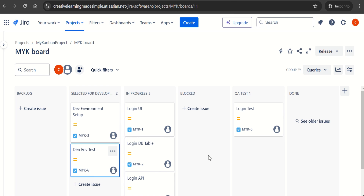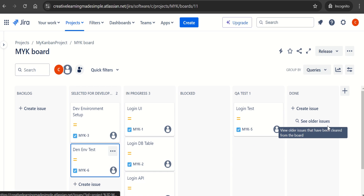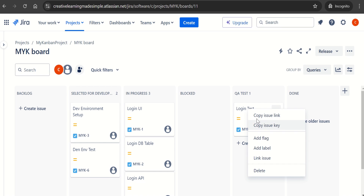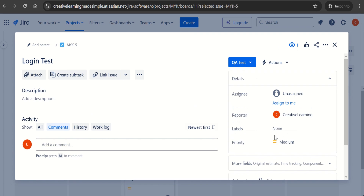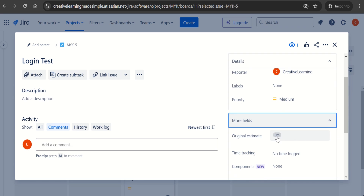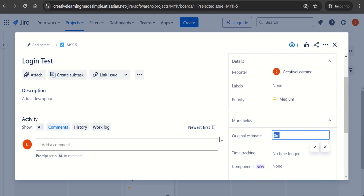Based on the work we are performing, each column has its flow. Once development is done, it passes to QA Test, and when QA Test is done, it is marked as Done. Now, if we want to give some estimates on a ticket, we can click on 'Login Test.' It shows additional fields like original estimates and time tracking. Let's say Login Test requires eight hours — we enter that and click OK.